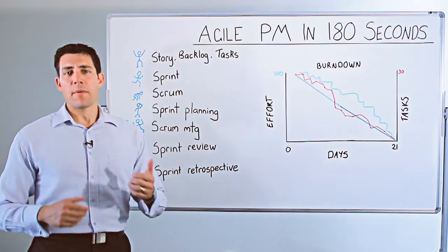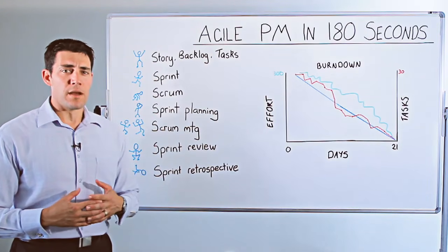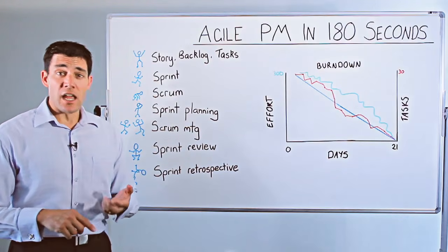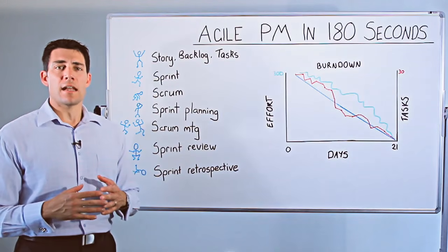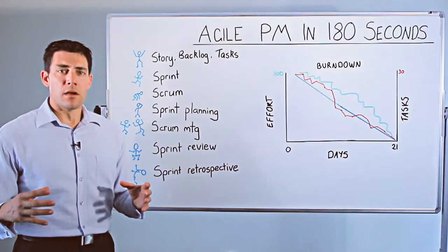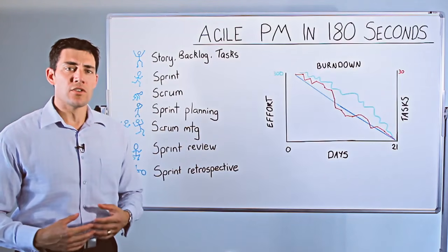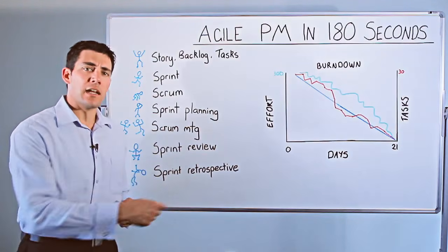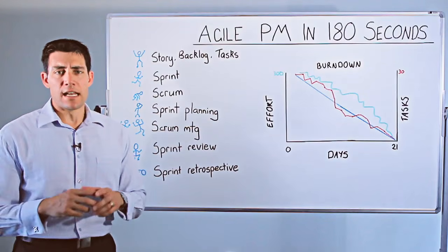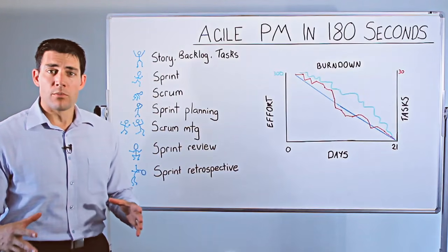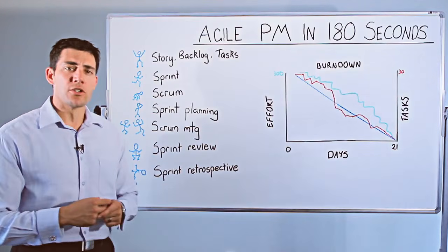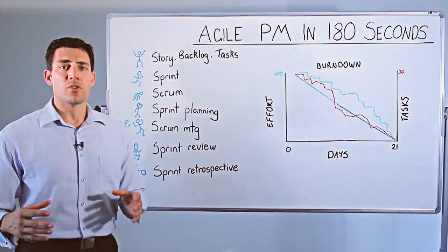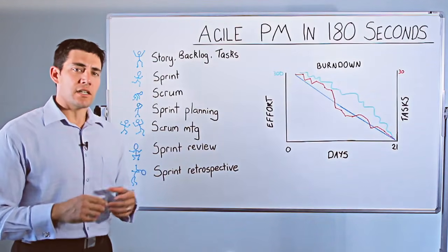Now, Agile Project Management came about in 1986-ish. A couple of Japanese fellows by the name of Nonaka and Takeuchi, studying the manufacturing process and supply chain and restaurants, oddly enough, came up with the idea that a rugby team type project team approach was the best way to get those projects delivered. So the metaphor was that you have a rugby team who takes the ball across the line, passing it back and forth until they get against the try line. When they observed and studied projects that had that cross-functional project team working together to get that project across the line, they found that that had a higher degree of success rate than, let's say, a bunch of individuals working asynchronously to achieve that same objective of that project.